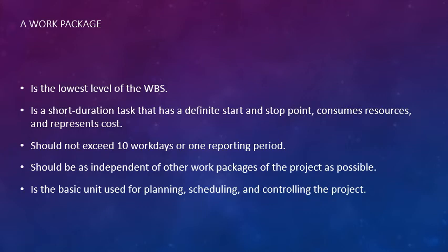It's a short duration task. And these are the things that are easily manageable and quantifiable. So they have a defined start and end point that consumes resources and represents cost. They should not exceed 10 working days or 1 reporting period. So you're trying to keep them so that at the end of each period, yes, we're checking that off and we move on to the next task.